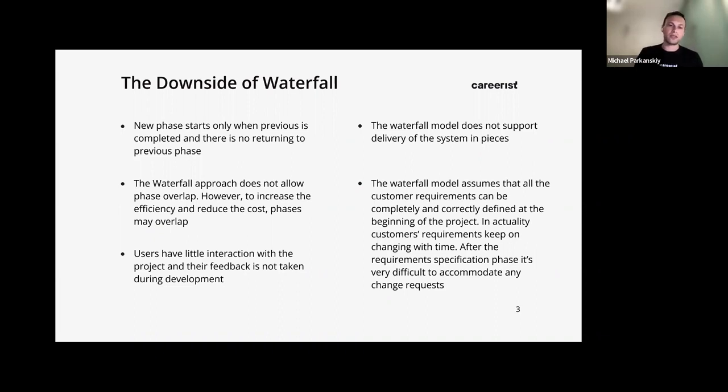Once you got an approval of the requirements, you move it over to the design, and the design team starts figuring out how the software is going to look, the colors it's going to use. It might figure out where the button is going to go. So they draw this out, this beautiful website, and you have to get this approved again. So you would send it back to the government agency maybe, and they will look it over and say, okay, we like the colors, we like how the look and feel is going to be. And it might take another month or two to approve. Then you get it back, and only at that point can you move to the development stage, right? So you see why it could take a really long time with the waterfall approach to get to the final stage.